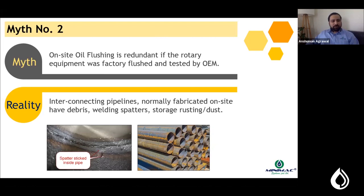Myth number two: on-site oil flushing is a redundant activity if the rotary equipment and supplied accessories were pre-flushed by the OEM in their factory. In any power plant, refinery, or manufacturing industry, multiple pipelines are laid on site between equipment and lubricating points. These pipelines may have been left in the project yard for a long time, resulting in rusted pipelines that carry rust into your system from day one.